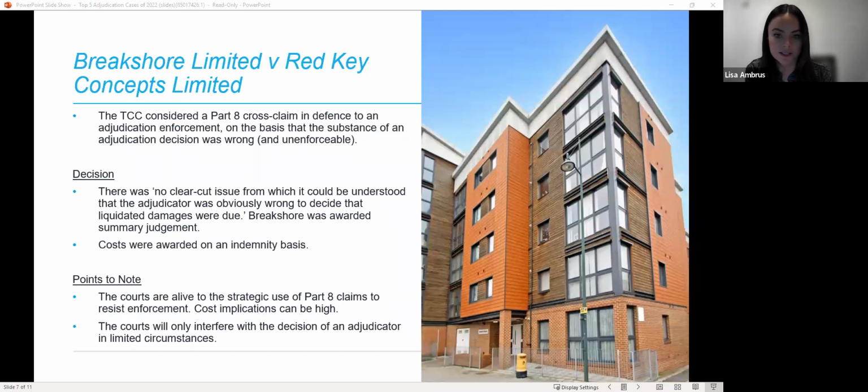Hutton held that the party resisting enforcement proceedings must show that firstly, it contests a short and self-contained issue that arose in the adjudication. Secondly, that the issue requires no oral evidence or elaboration, except that which is provided in the enforcement hearing. And thirdly, that the issue is one which would be unconscionable for the court to ignore.